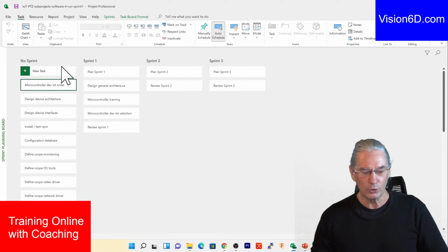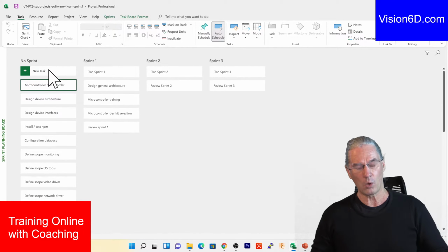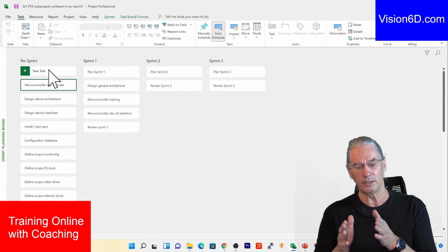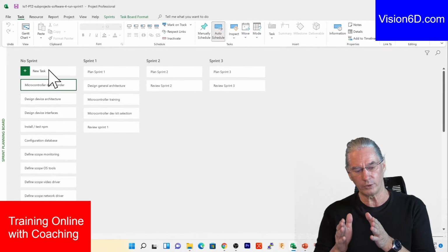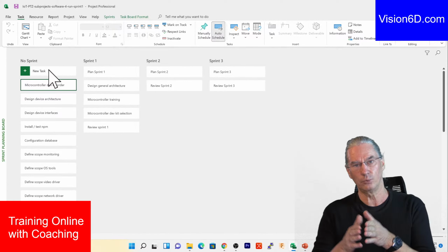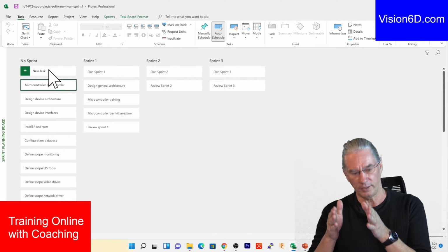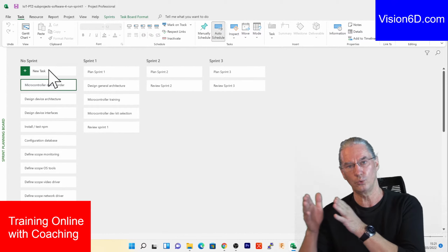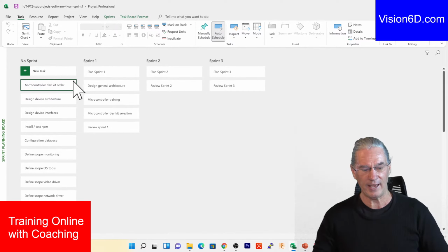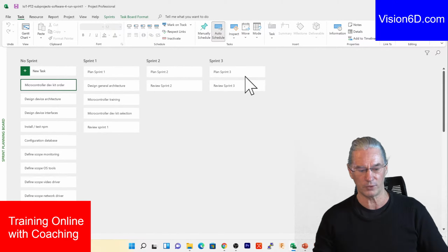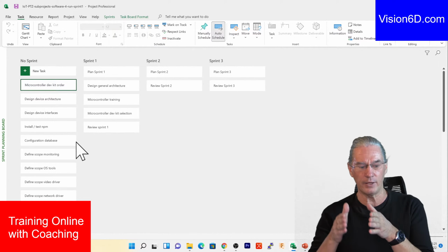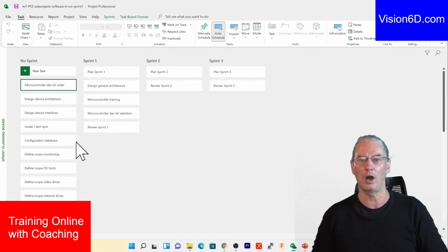To understand the planning in an agile project, what we do is take boxes, in our case of 2 weeks each. And I have 3 of those boxes. In this view I am able to do the planning of the tasks that I will perform in each of those sprints.